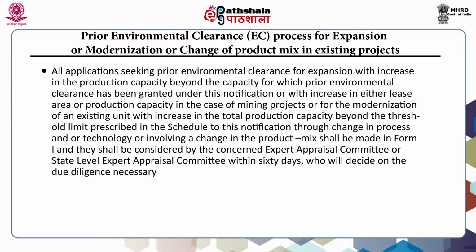All applications seeking prior environmental clearance for expansion with increase in the production capacity beyond the capacity for which environmental clearance has been granted under this notification, or with increase in either lease area or production capacity in case of mining projects, or the modernization of an existing unit with increase in total production capacity beyond the threshold limit prescribed in the schedule to this notification through change in process and/or technology or involving a change in the product mix, shall be made in Form 1.